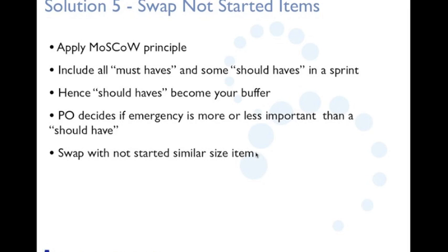This is one very effective solution that you could use to handle these situations. A lot of teams handling must-haves, although Scrum doesn't say so, say that independence should be given to the team to decide the sequence in which they want to work within a sprint. But the team should also use common sense, working on the must-have features first and tackling should-haves later in the sprint.